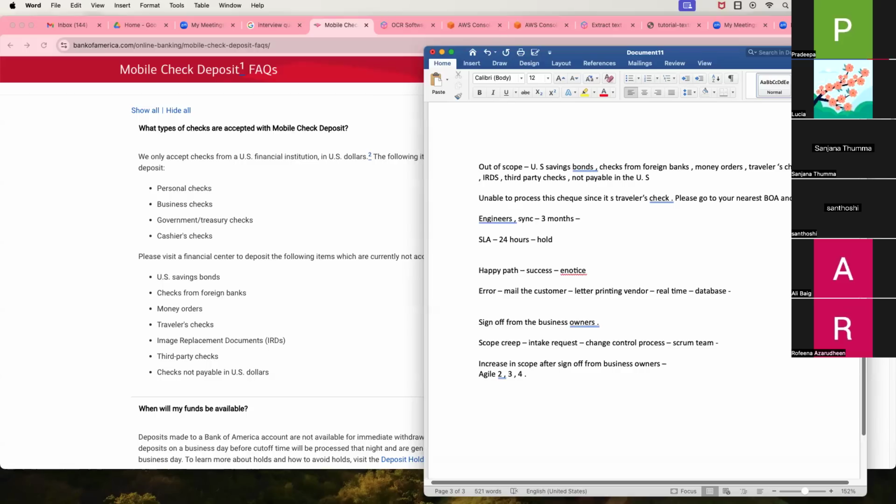So number one thing is, we are not gathering requirements from time to time for agile methodology. Even for agile methodology, we are gathering all the requirements at once, and we are doing the development and testing in sprints. So after all the solicitation sessions, you gather all the requirements, you write them in BRDs or user stories, however you want, and you get the sign off. That's all. But to complete all the user stories, whether it's going to take 2 sprints, 3 sprints, 4 sprints, or 6 sprints, we don't know.